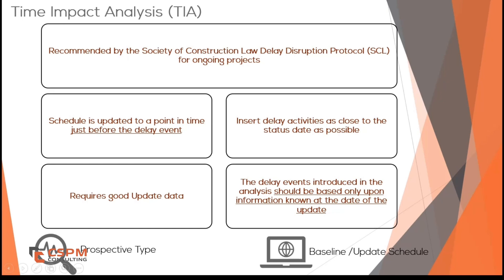For example, let's say you have a project with a baseline schedule, but the actual start dates of activities are delayed due to unforeseen circumstances — like a delay in receiving engineering approvals. If you were to analyze this using Impacted As Planned, you might miss out on capturing the real-time impact of these delays.